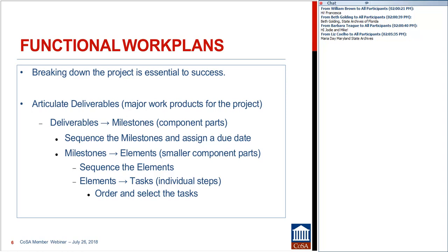So to say that we look at a project and it has 2 to 4 deliverables. Those are the major big buckets of work that we know that we have to get done and that we have to work with other staff to complete. No matter what, those wholesale deliverables are too large in themselves to describe the work that needs to be done. They are a large unit that will require further detail and elaboration for the work plan to be created and executed well.